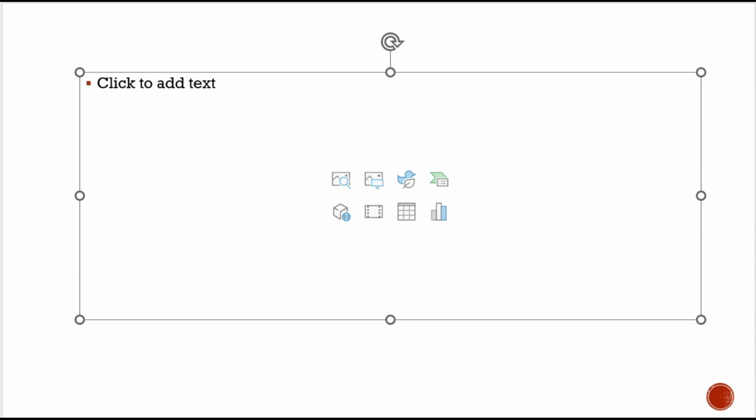But there are two types of controls that we can set in a project: a no-go control and a steering control. No-go control, for example, charter is something that we cannot proceed with the project further without. We cannot go forward with the project without having a project charter. We just can't move forward.